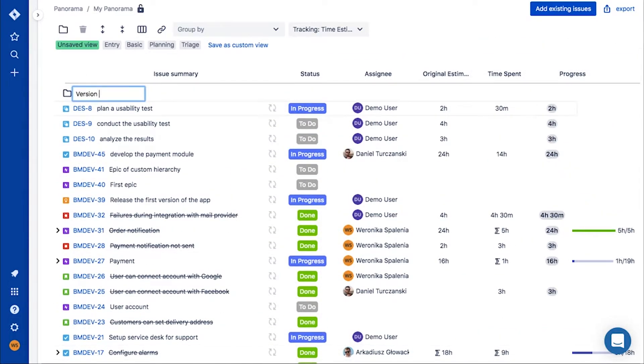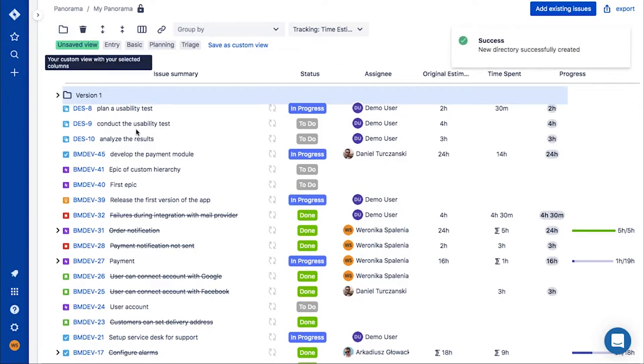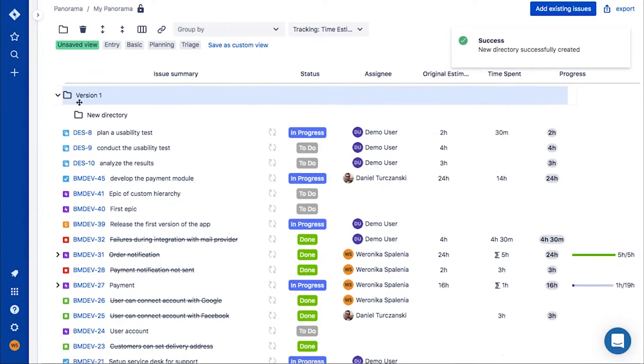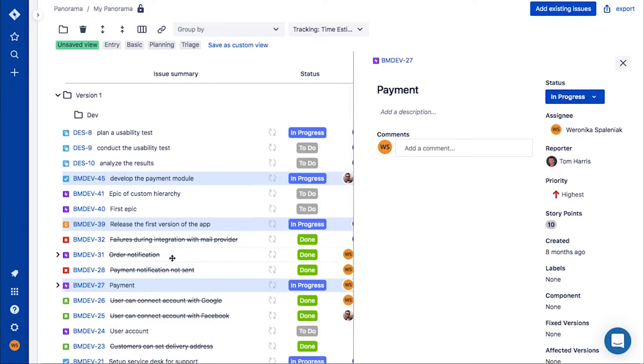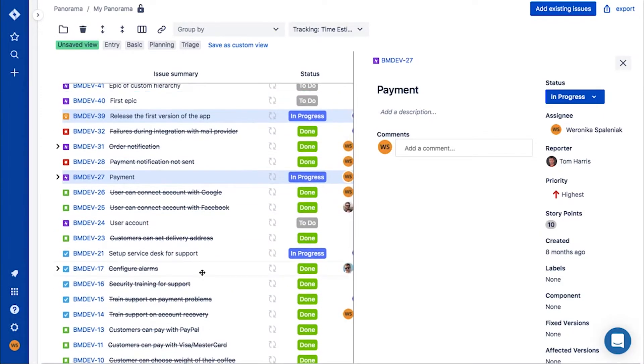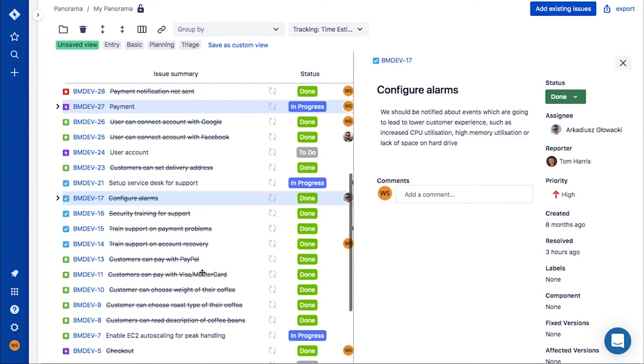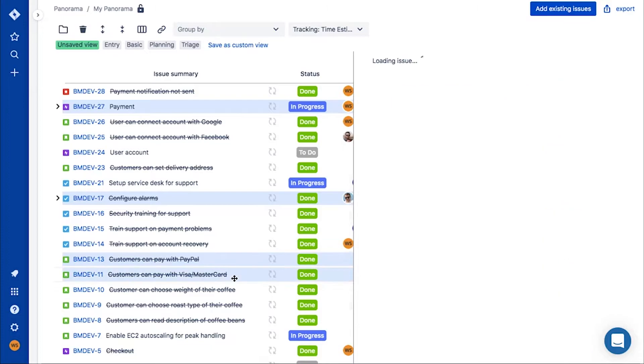If you want to plan a feature or version releases, you can create a folder for each feature or version. Move certain tasks underneath them and then structure them however you like.